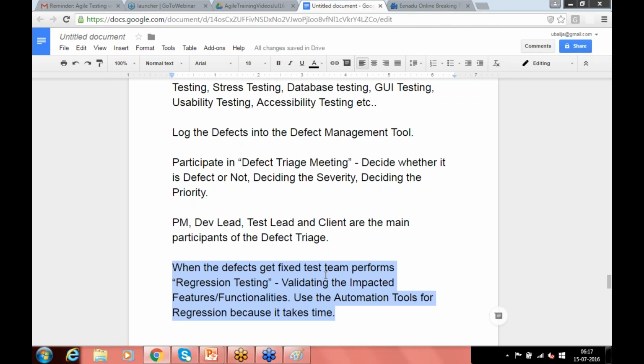Then you are going to do more and more regression testing. You might have just completed the testing in the last 2 days, but again you may have to repeat because there is a change in the user story, or there is a change in the existing code that we have to do. And also considering the shorter life cycles in Agile, 4 weeks of a sprint delivery, automation is going to be the key. Unless you have automation, you cannot really achieve what you wanted to do in that 4-week sprint. So automation is going to play a major role in terms of Agile testing, or Agile development.